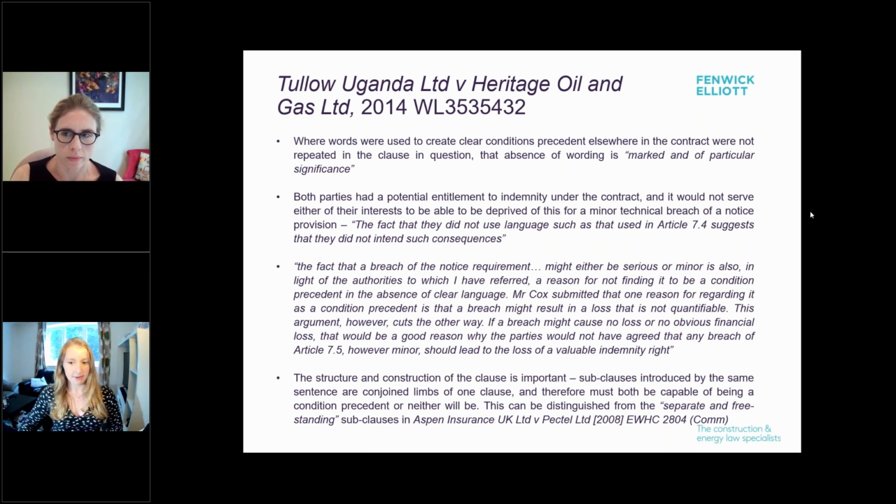There were clear examples of conditions precedent elsewhere in the contract, as I discussed earlier, and the wording that was used in those conditions precedent was not repeated in Article 7.5a. It was noted that where no such wording was used is marked and of particular significance.